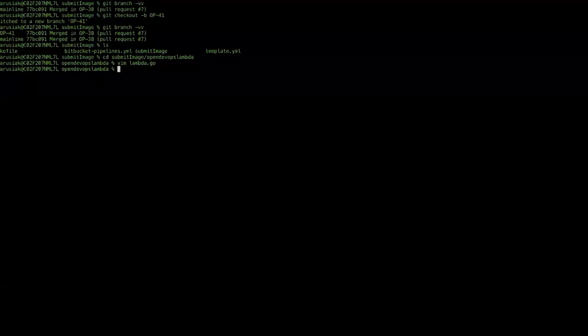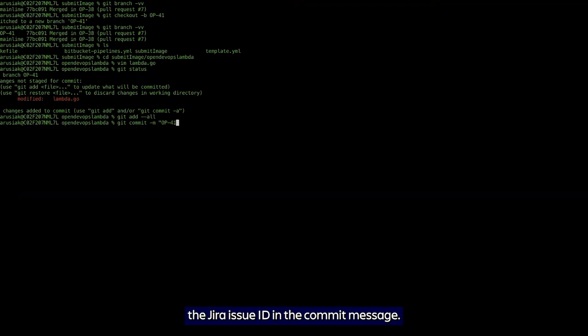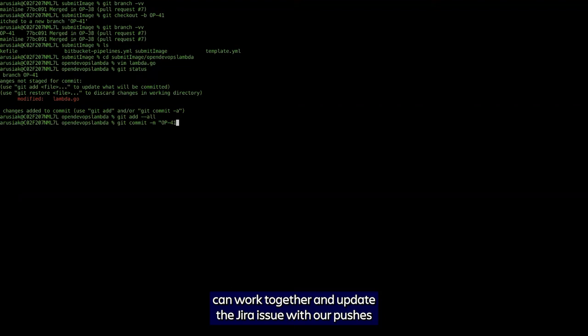Now we've got a single file that's changed, we're going to do our standard procedure of git add and git commit. When we do our commit, we want to make sure we put the JIRA issue ID in the commit message. Again, this is so the JIRA and Bitbucket integration can work together and update the JIRA issue with our pushes and various commits.